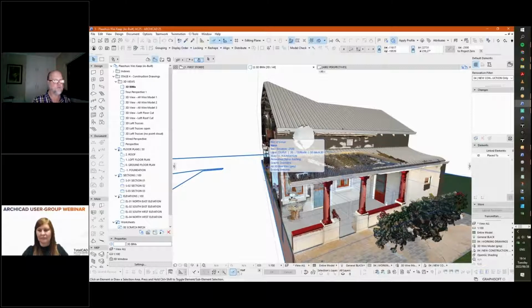So obviously the logistics of having to travel to the site. There's people across the country that can scan for you. We've got 9 people across the country that we can send from the closest proximity to the site. So traveling is a factor. How big the building is. If we can't scan the building in one day, if it's a large building, say 5,000 square meters, that might take us 2-3 days to scan. That's a factor.